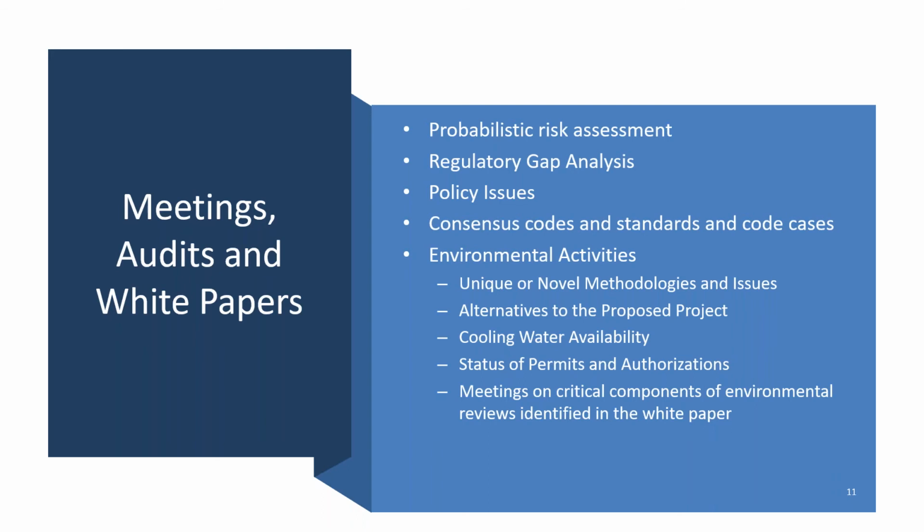In addition, a regulatory gap analysis report should be submitted, listing those 10 CFR Part 50 or Part 52 requirements for which an applicant plans to request an exemption. And I will note that we have developed white papers in this area already, that I can maybe provide after the meeting as a reference document that you can look at. And in addition, we've provided feedback already to some applicants in this area.